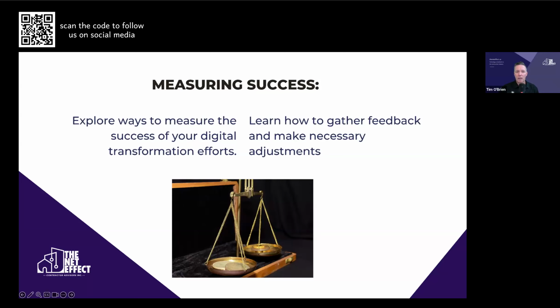So that training is a cost to your company, because if it's 50 hours per employee on average, and then you multiply that by the hourly rate, that's going to give you another cost that you need to consider.